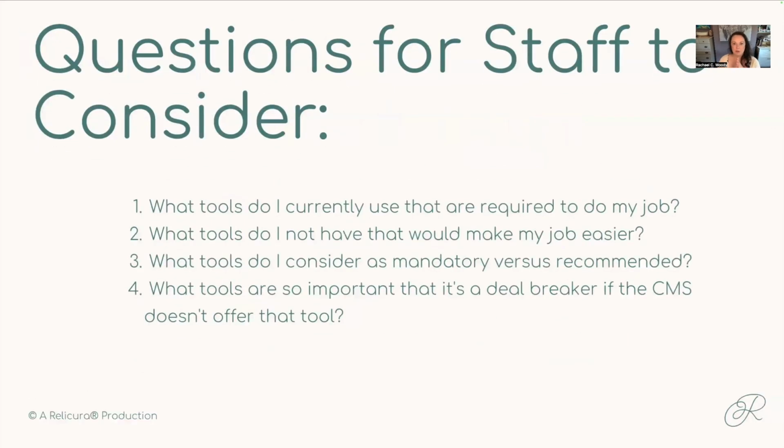Okay, once you have that procurement team formed, we are trying to work our way towards specifications, because the specifications will help us narrow down essentially what are eligible software options out there for us and what makes the most sense. So providing a sense of criteria to help us do the shopping, and then we're also going to use that same criteria as a scoring rubric to help us make a decision on which of the different CMS options we want to go for.